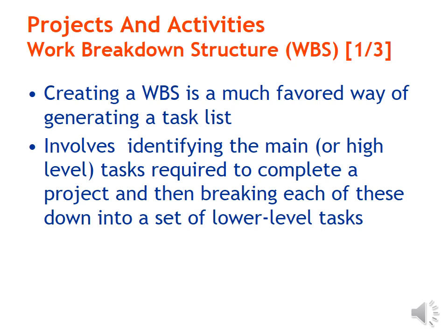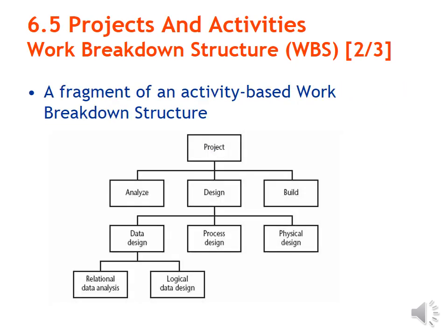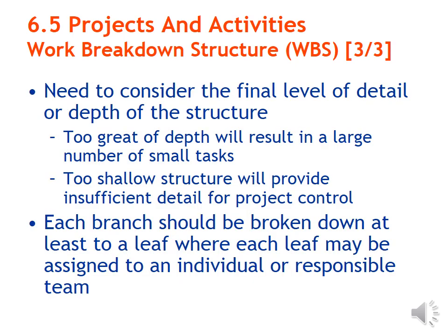It's a favored way of creating a task list. It involves identifying the main tasks required to complete a project and then breaking each of these down into a set of lower-level tasks. So, a fragment of an activity based work breakdown structure: project, analyze, design and build. Design will have data design, process design and physical design. Data design will have relational data analysis and logical data analysis.